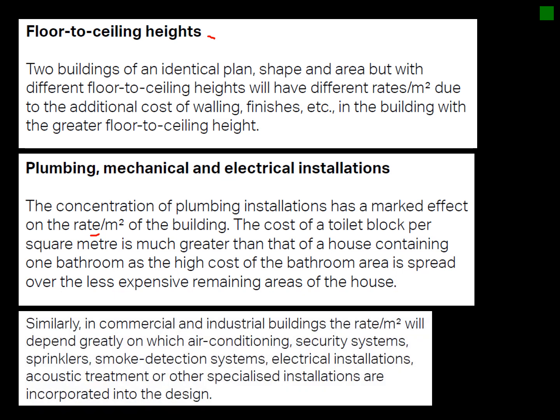Similarly, there's a big difference between commercial and industrial developments — developing a nuclear plant versus a normal house represents two extremes. Industrial developments with big storerooms might be cheaper, but if you need to refrigerate that storage or install air conditioning for that volume, it can raise the cost quite a bit. Those are the things you need to look at.